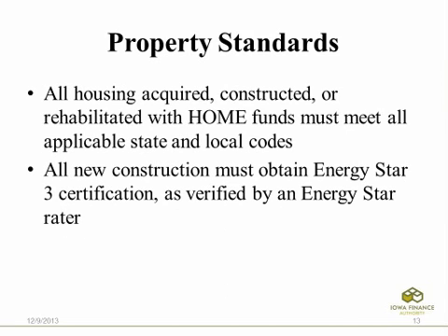As far as property standards are concerned, all housing acquired, rehabbed, or assisted with HOME funds must meet applicable state and local codes. All new construction must obtain Energy Star 3 certification as verified by an Energy Star rater.